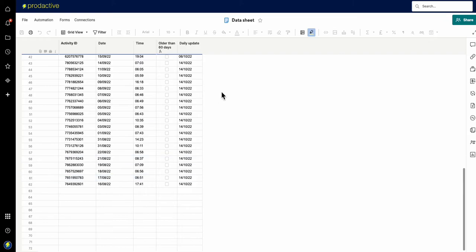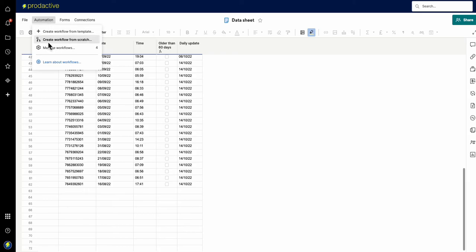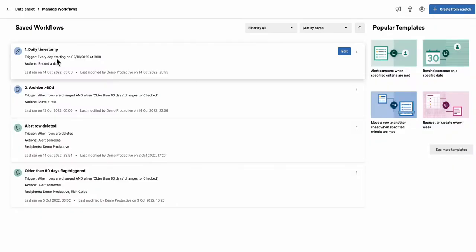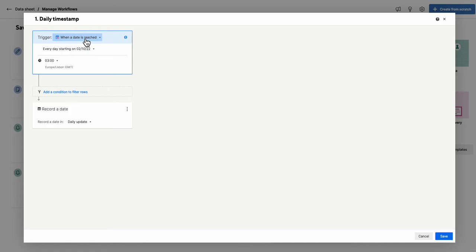So in order to get the sheet to update itself automatically, you need to have a helper column, which is what I call a daily update column. So if you look in terms of what I've got here, I've got workflows and I've got a daily timestamp. So what I've got in here is I've set the trigger up and it's on when a date is reached.